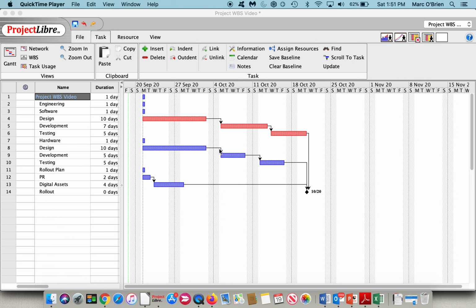I will have a separate video on earned value management costing and resource breakdown structures used in ProjectLibre, but today we'll focus on the work breakdown structure, which is widely used and effective from a project manager's toolkit for tracking project progress and costs. The work breakdown structure, referred to from now on as a WBS, is the project broken down into successive levels until the proper level of detail has been defined. The project is broken down from summary tasks, subtasks, detailed tasks, and work packages. This is an important checkpoint when establishing the project plan to ensure you are tracking at the appropriate detailed level.